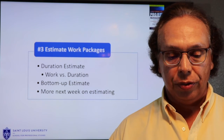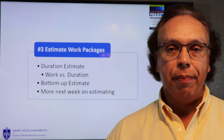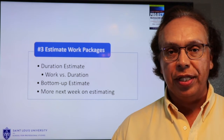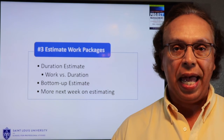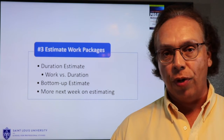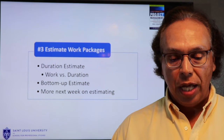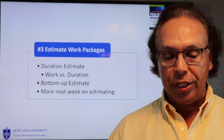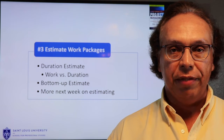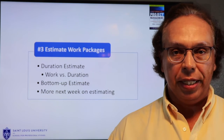Step three is estimating the work packages. You need to understand the difference between work and duration. Work is the amount of time that it takes to complete a task; duration is calendar time. For instance, it may only take four hours to pour a concrete pad, but it will take another four days for that pad to dry before you can build on it — so the work is four hours, but the duration is four days. Bottom-up estimates need to include not only the labor, but the equipment, materials, and other supplies. When doing your bottom-up estimating, consider skill level and productivity — experts will complete a task much quicker than a novice. We'll talk more about estimating next week.